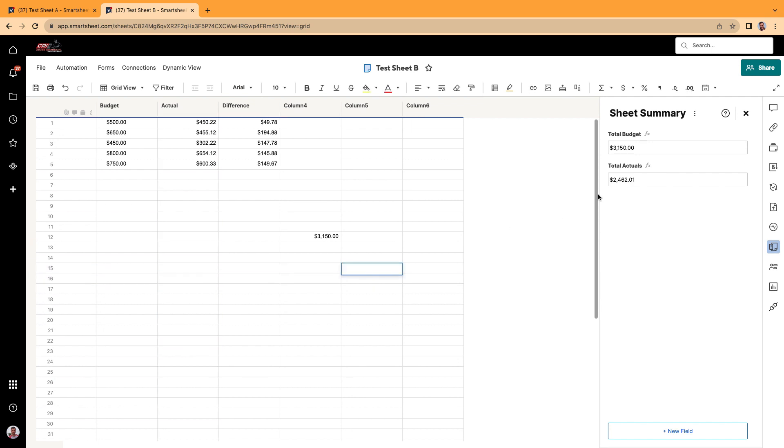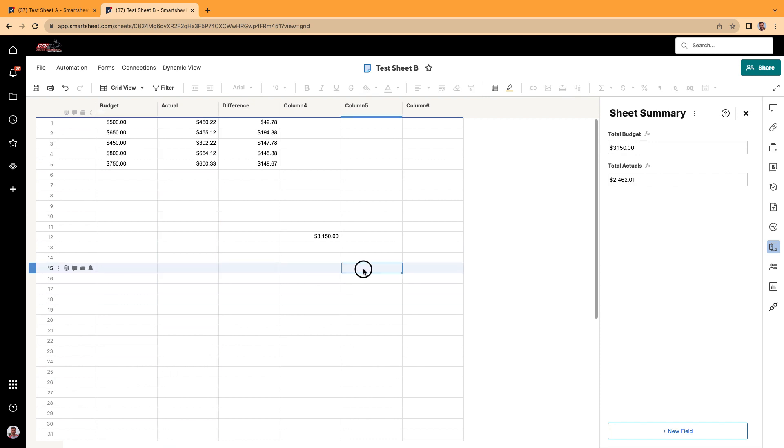Double click into the cell. Click on the sheet summary. And I'm just going to go like this. I'm going to type it in this time. Total actuals. I'm just typing in the name of this right here with the pound sign. Total actuals, bracket, and then pound sign.